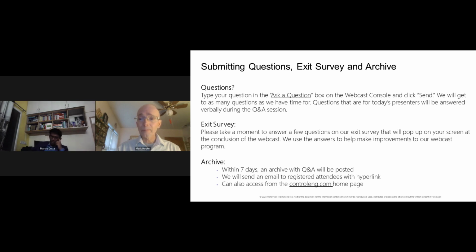Yeah, so I will talk about case study 1 because that is where we learned something very interesting. In case study 1, when we identified the problem of training the new hires when the plant was not even constructed, and making them ready for commissioning when the plant is ready, we provided a virtual reality solution. And we missed that one part: some people are not comfortable wearing a virtual reality device.